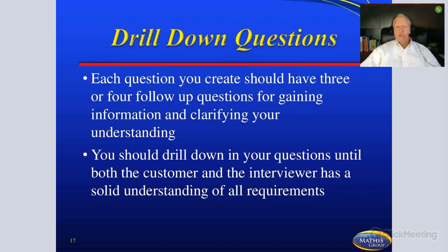Each question we create should have somewhere around 3 to 4 follow-up questions for gaining more information, gaining more clarity. Now, you will not ask all 4 of those questions. Okay, so I don't want to freak you out. You're not going to ask all 4. You've got them available, but what that customer tells you will make a difference on which of those 4 you're going to come back with that they did not hit.